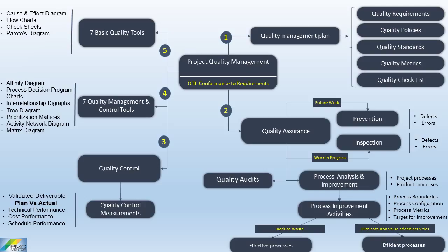Flow charts are a kind of process maps used to display the sequence of steps and branching possibilities that exist for a process. Check sheets are used to gather data and present this data in a histogram to identify causes of problems. Pareto's diagram is a histogram ordered by frequency of occurrence to show how many results were generated by each identified cause. Histogram is a special form of bar chart used to describe the central tendency, dispersion and shape of a statistical distribution.